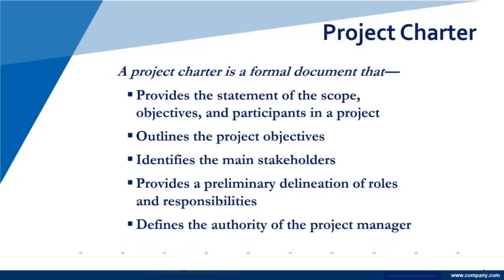And not least, and this is an important thing for certification, know that the charter defines the authority of the project manager. We talked earlier about different kinds of organizations. Some are matrixed, some are not. Part of what the charter will help do is define that authority. It sometimes gives it to a specific person as a project manager. So it's not simply, we'll have a project manager.